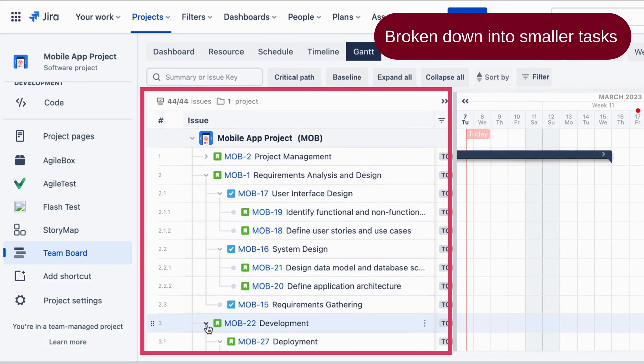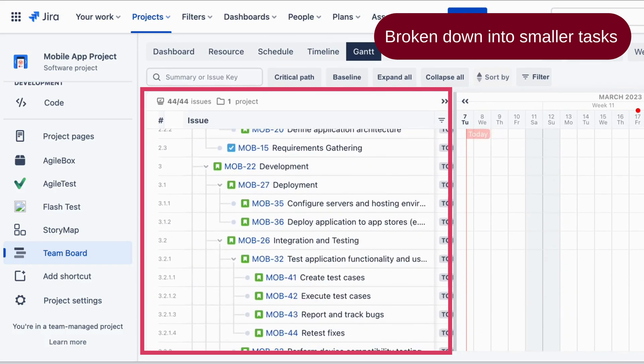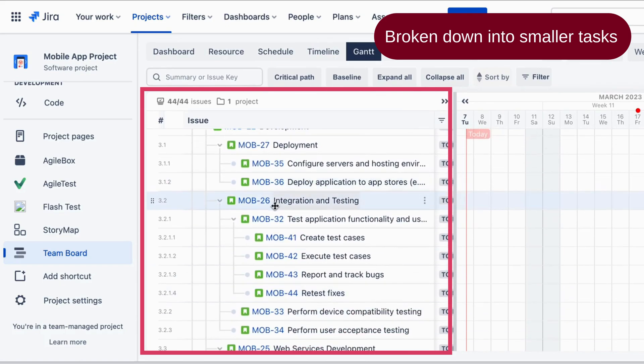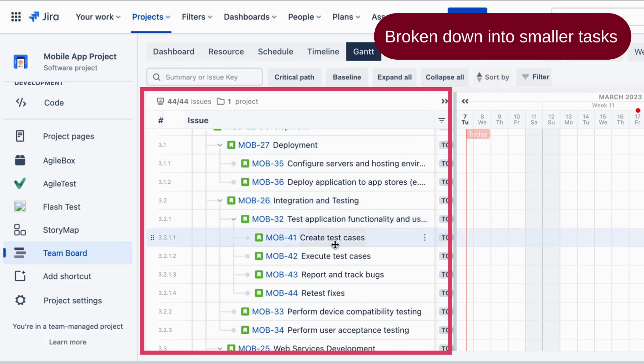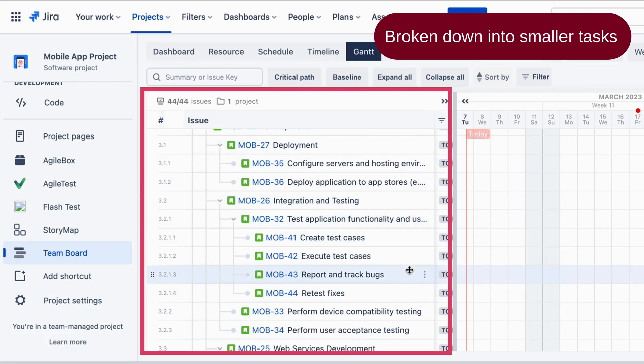For example, under the testing element, the test application functionality and usability task might be broken down into create test cases, execute test cases, report and track bugs, and retest fixes.